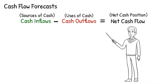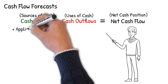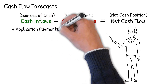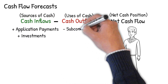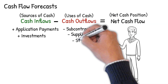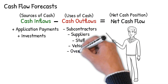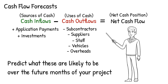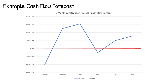After predicting your cash inflows — such as payments of applications and investments — and cash outflows — such as subcontractors, suppliers, staff, vehicles, and overheads — each month, and subtracting one from the other, you could be left with a cash flow forecast that looks something like this. As you can see, the cash flow enters a negative position in January and April, caused by more cash needing to be paid out than is predicted to be paid in.